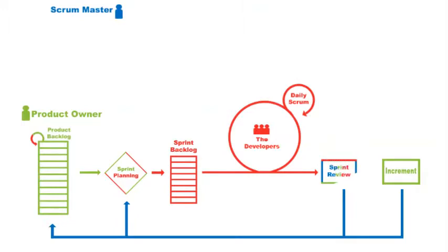The sprint review is an opportunity for the Scrum team and its stakeholders to participate in the inspection of the work that has been produced to meet the sprint goal, and how this progresses the development of the overall solution. The outcome from the sprint review provides a feedback loop to both the product backlog and the choices made during sprint planning. One thing you can be assured to have as an outcome from your sprint review is an updated product backlog, even if it is agreed that the current order is correct.